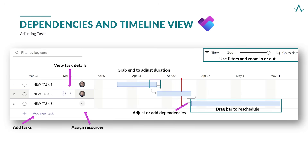The timeline lets the project manager manage task timing and ownership. Drag tasks to reschedule, resize to adjust the duration, and link them to set dependencies. The red line shows today's date, and team assignments are shown right next to each task.